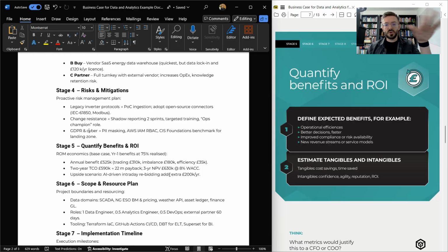So if you can look at industry benchmarks, like from marketing materials and other businesses, take it with a pinch of salt and say, right, well, these sources report £1 million a year saving, so we're going to estimate a $600,000 a year saving. That way, you really put your ask through the ringer. Don't try to cheat to get your ask over the line, but actually really test it.